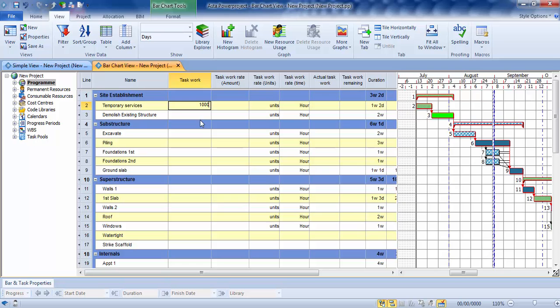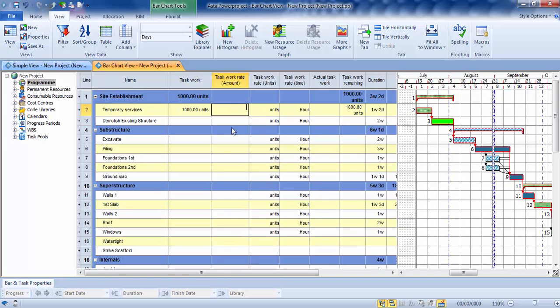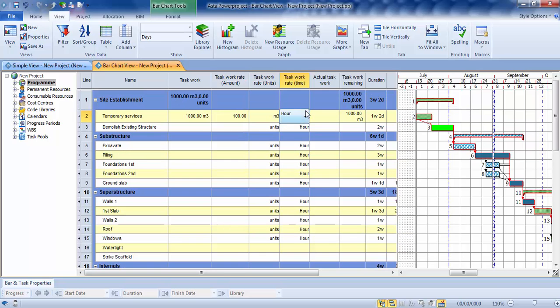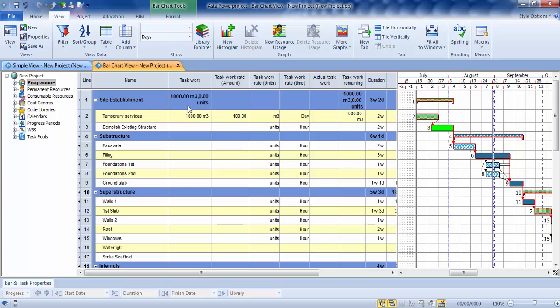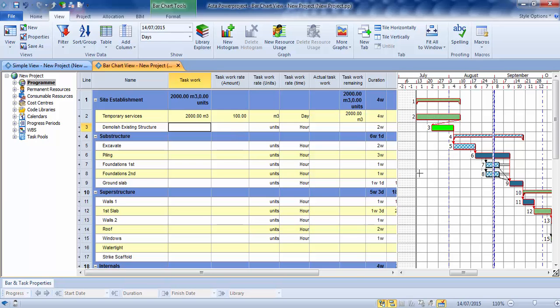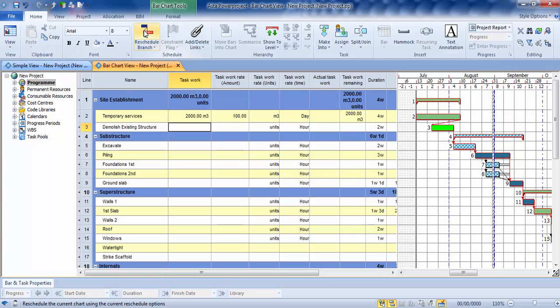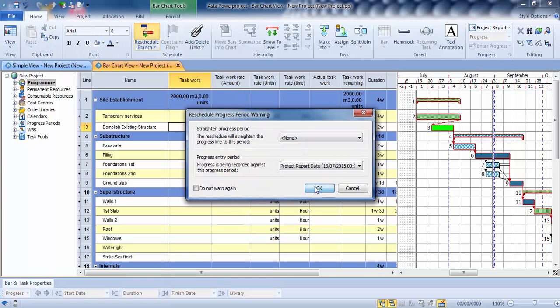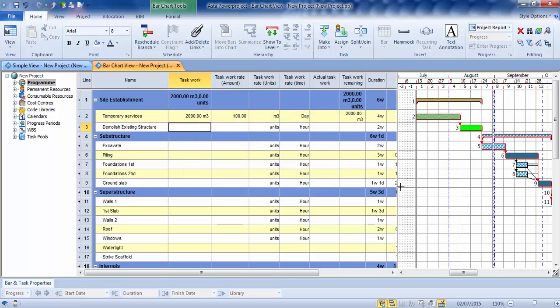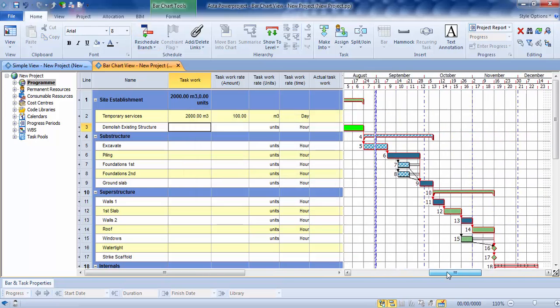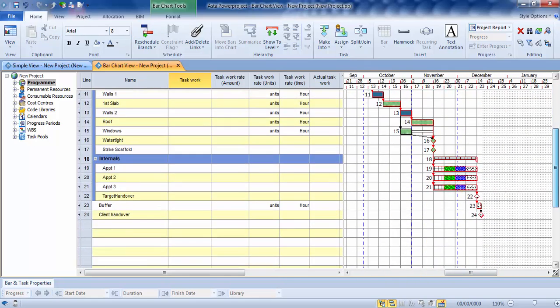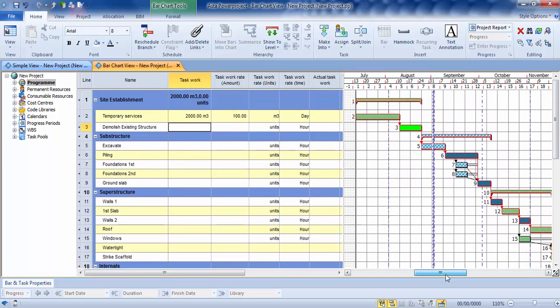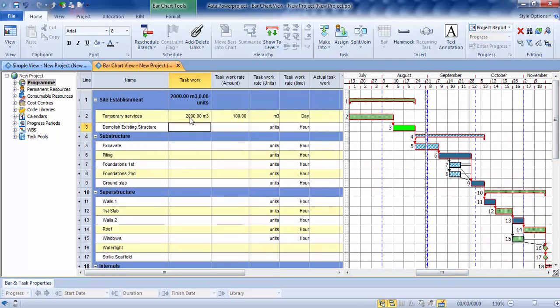So you don't actually have to go and assign a resource to a task to find this information out, which you do on other software packages. You can just type it into this pre-prepared table and it'll work it out for you. So here we go. There's an example here. So a thousand units, whatever that is. Let's say we can do 100 meters cubed per day. OK. And you can see the task is now increased by a small amount there. So it's now two weeks. So if I was going to increase the task work now, I said that was going to be now 2,000. How much longer would the task be? And the task increases in size. So by using the table here, you can have it affect the duration of your task until you get to a recognized duration for that particular task.